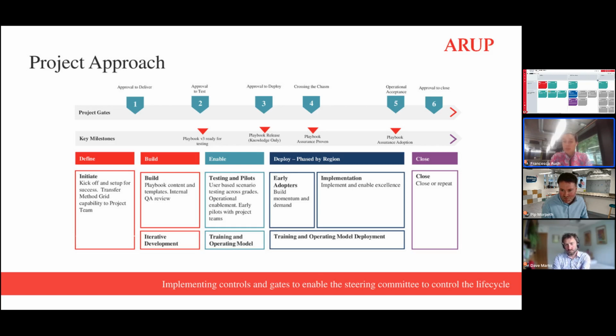And also, speaking back to what I said about the steering group, we did introduce gates and quite strong governance to make sure there was continual engagement in what we were developing, that we were remaining close to brief, and that it was actually responding to what our survey had told us was the ask, so that we could have a product that wouldn't atrophy at the end. There would be engagement with it, because it's a product created for people by engaging with the people who would be using it. And the gateways were our way of doing that check-in, just to make sure that we weren't applying our own biases or going in a direction that didn't suit project needs.